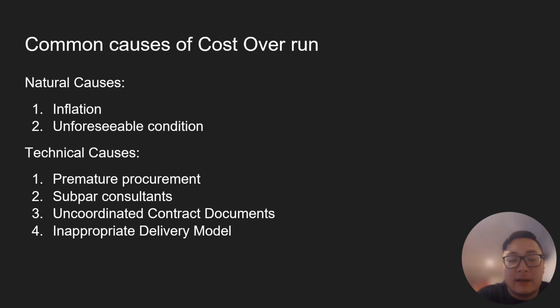So at the end of the day, they're in here for business. They want to make more money out of it, and as a business owner, the most logical thing to do is to prolong the project as long as I could, or create more detail, or push high quality or high standard items or products for you to purchase, because that would be beneficial for me to get more profit out of you, and that would be a good example of a delivery model that promotes cost overrun.